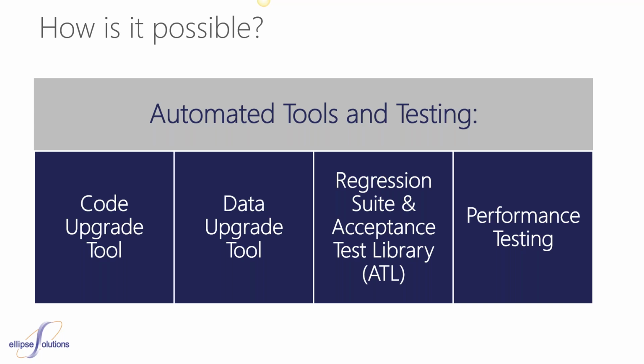And there are going to be examples where, I hate to say it, but you're going to have to manually test certain areas. And when we talk about performance testing, this is not the latency for running a specific transaction. This is a way to stress test your environment. So if you have some cyclical, very transaction-sensitive periods of time, the easiest example is retail and Black Friday and the subsequent 35 days. That's the thing that you would need to use from a performance testing perspective.